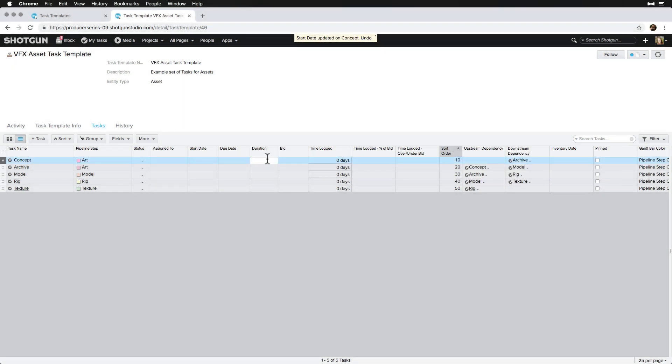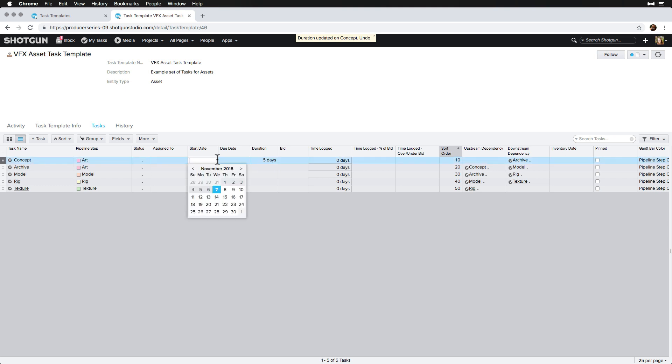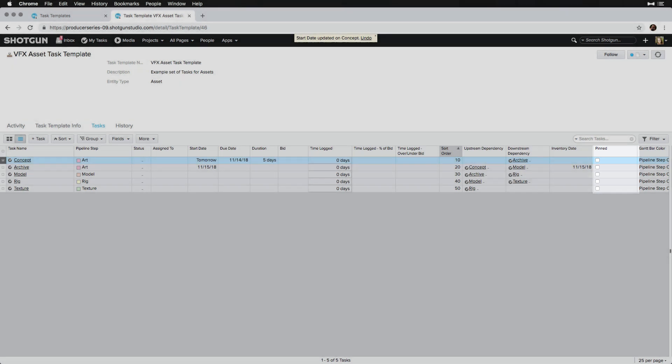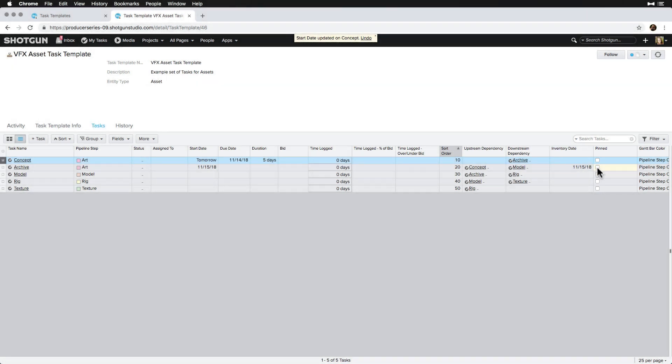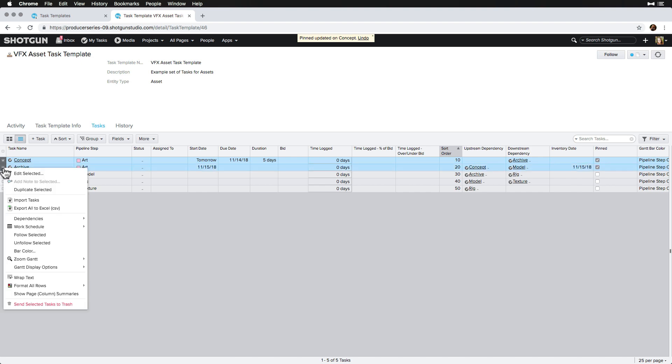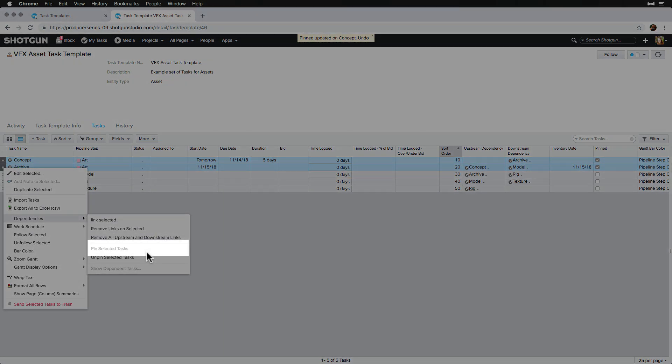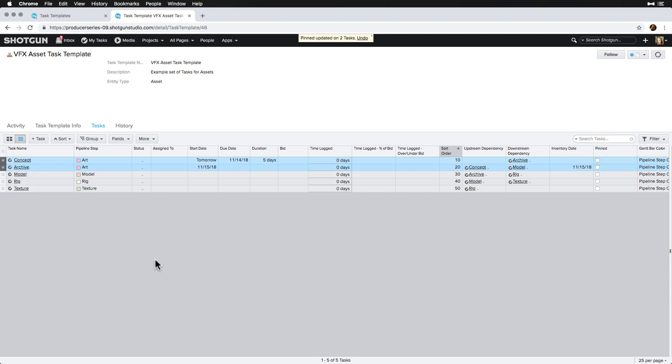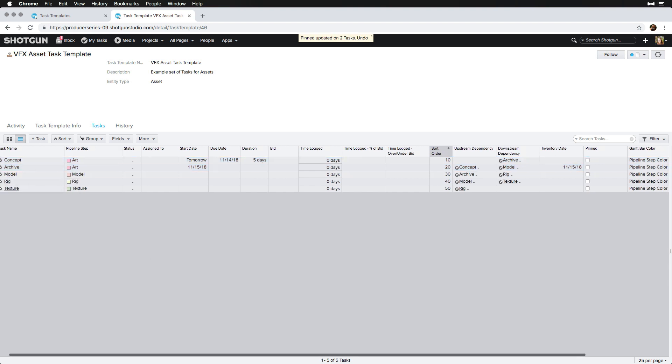If a task is pinned, the inventory date lets us know what date Shotgun would use as the start date without the pin. We can choose to pin any task where we don't want those task dates to update automatically. This keeps the connections between tasks, but takes the task off autopilot. We can pin tasks by checking this box or by right-clicking on the task and selecting Dependencies Pin Selected Tasks. We'll cover more about pinning in the scheduling with the Gantt chart topic.